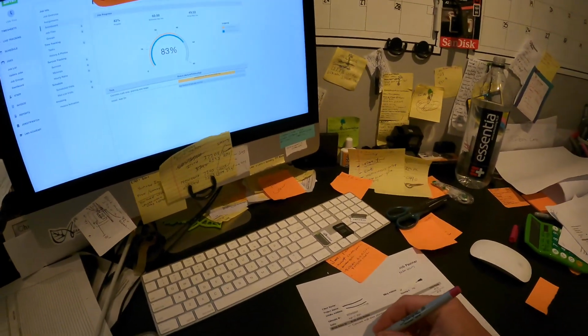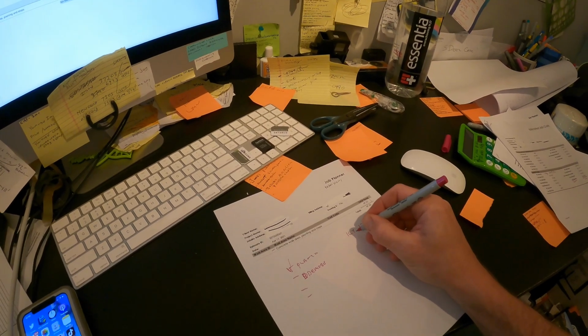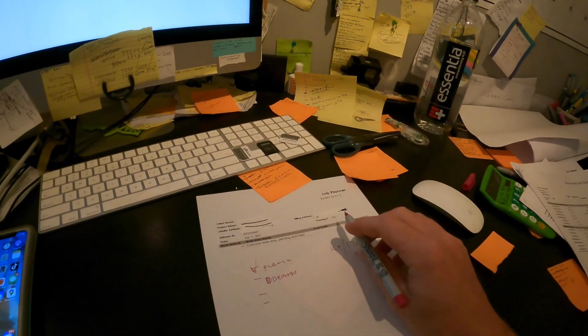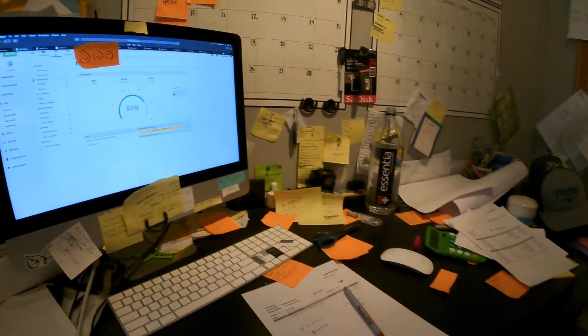Like, okay, we're on the planting work today. We check into that, and it's going to track. Okay, they had 16.4 man hours actual of 17. Cool, under budget, awesome. And it helps track all that stuff. It is super, super cool. So this job we did well on.